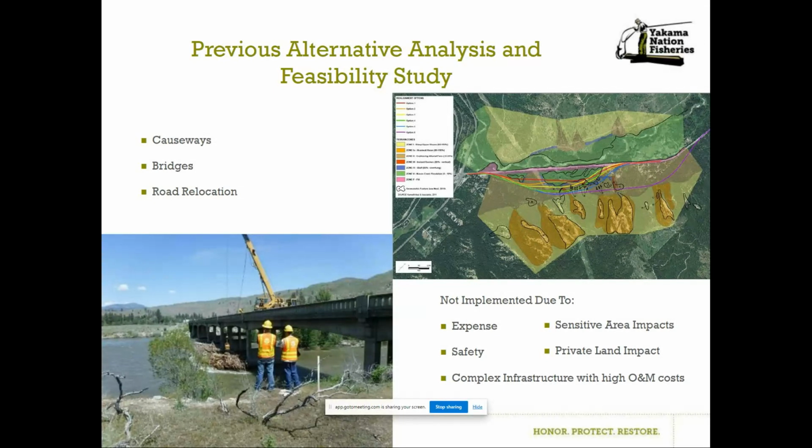Option 6, just for the road and mitigation, the estimate was 35 million. We've been very open and honest that the preferred project would be to get the entire road out of the floodplain, but that's where you come up with 35 million. So what this does is set the stage for the future for getting that next portion out of the floodplain. Our phase 1 gets that one portion out. Our phases 2 and 3 are restoration work with that other section of roadway still in place.